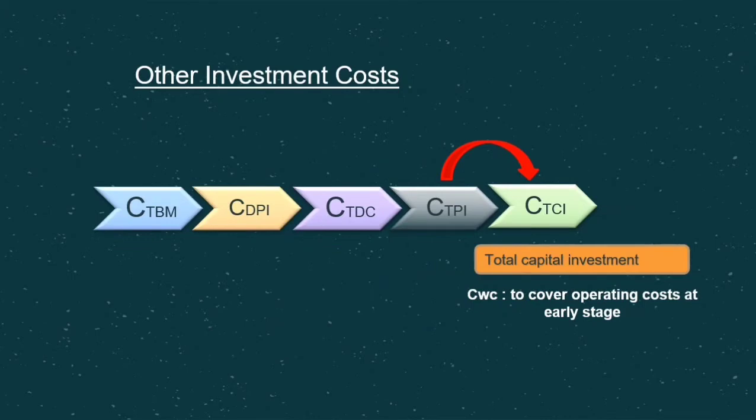Finally, the total capital investment will be obtained by adding the working capital fund to CTPI. Working capital funds are important to cover operating costs at an early stage.